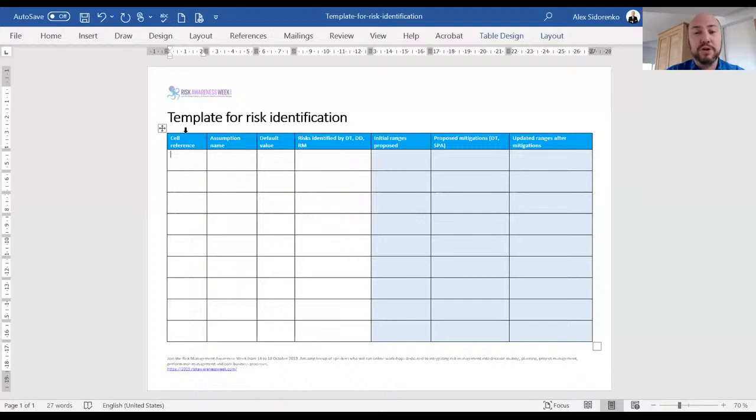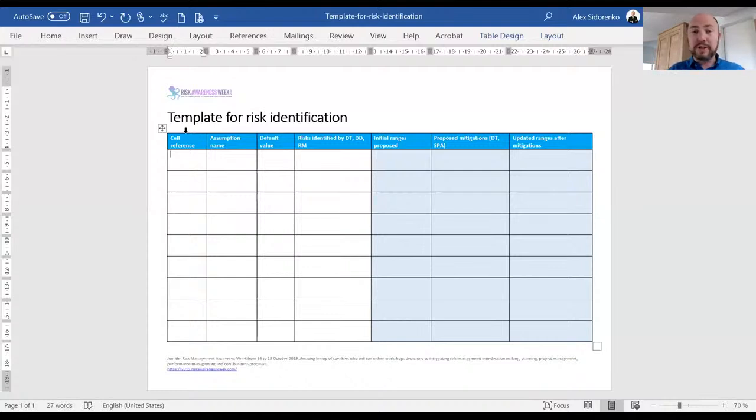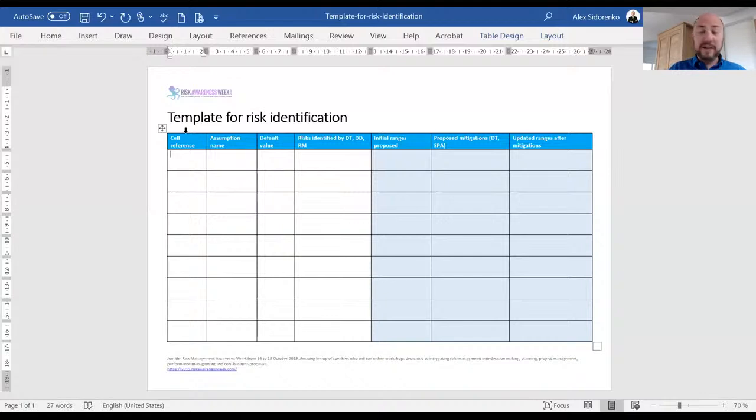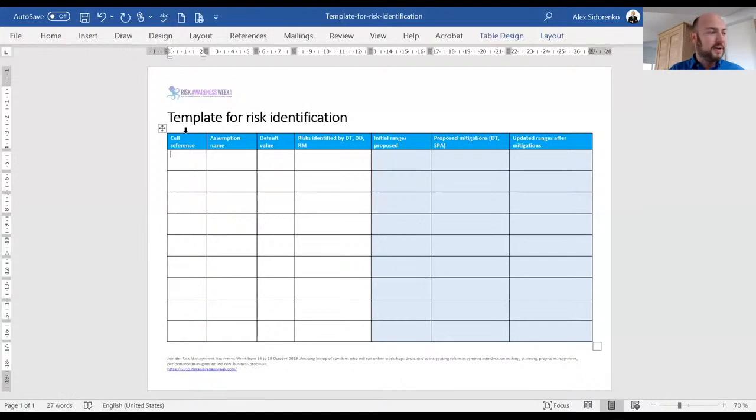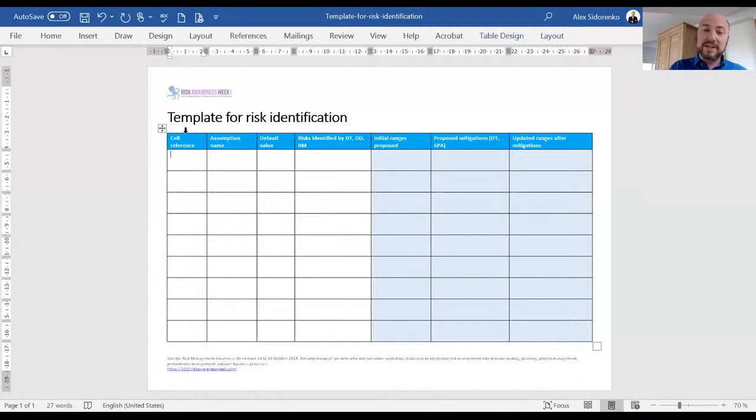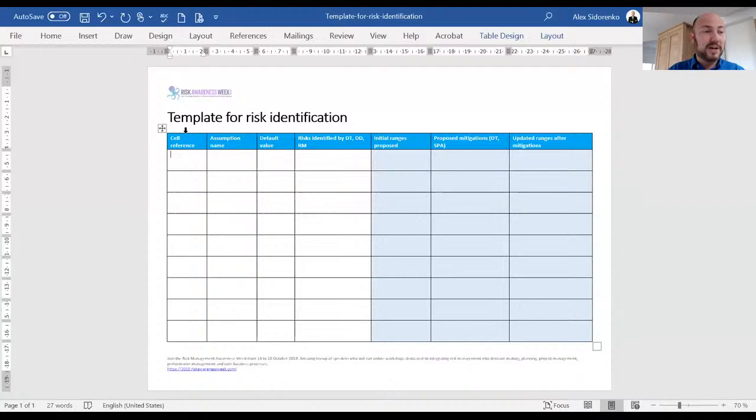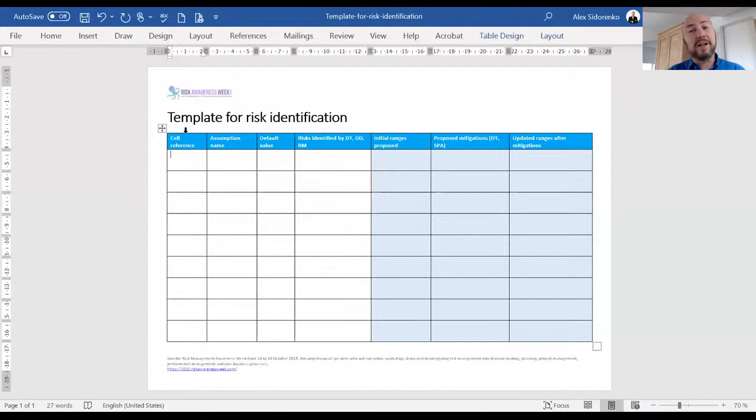This is actually much more difficult than it seems because you may potentially need to run a quick sensitivity analysis to determine which assumptions do or do not impact on the decision. In an Excel file or any other software where the decision is actually calculated, there are assumptions that are listed as assumptions. Sometimes they're color coded differently, sometimes they're put on a separate tab which is called assumptions. The reality is most of the time those assumptions are spread out throughout the Excel spreadsheet.